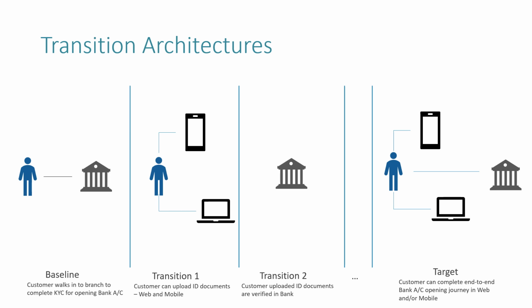Target, we can modify the target based on these transitions, but transitions we define more concrete. So if our roadmap is to, in 2 years time, achieve the target, and our transition 1 is for next 3 months, transition 2 is for next 6 months after. So we will try to provide a lot of detail into these transitions, and we will keep our target open for modifications. And as we achieve transitions, we might change the target also.